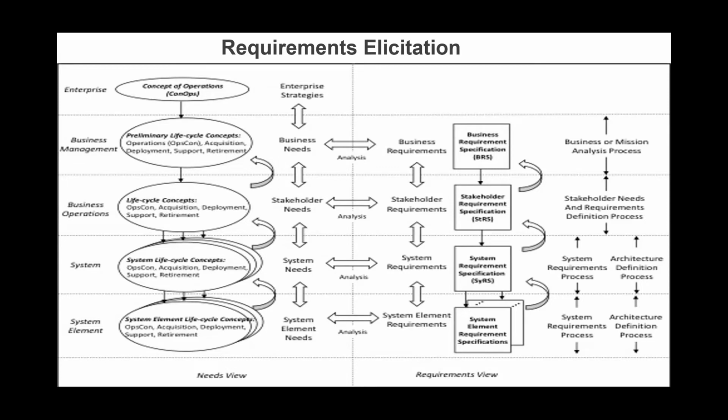And that is the reason why, for the life cycle of projects, if for a railway system it is 5-6 years of a mega multi-billion project, the first year or so is basically spent on coming up with these requirements. So you will see behind the scenes announcements that works are happening, but the things that are happening are basically coming up with requirements, identifying the business needs, identifying the stakeholder needs.